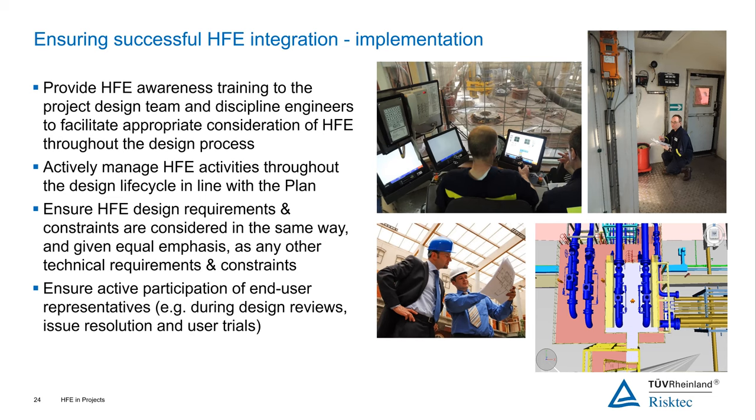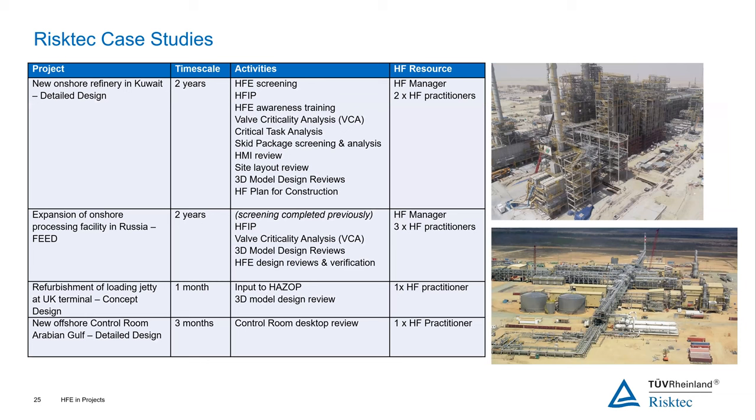So on this slide, what I wanted to show, thinking about the projects that RiskTech Human Factors has been involved in, is an idea of how it can vary. Here's a couple of projects, and you'll see that we did a project throughout the detailed design phase for an onshore refinery in Kuwait. And that was about a 2-year project. So we had a HF manager, because on our list it was a high level of HFE resource. We had a dedicated manager, and we had a couple of people that were doing the design reviews,